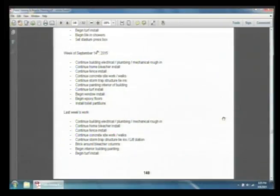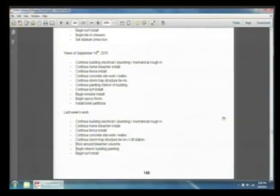In order to lay that surface correctly, there won't be any fence fabric installed on the fence pole. So what we'll do for the October 2nd and a few weeks to follow until the track is laid is the top rail and bottom rail will be installed about a foot to 2 feet up, so that it serves as a barricade around the asphalt track in the field during those two remaining home games and few soccer games that we're going to be able to fit in October. And then once the track surface is installed, then they'll put the fence fabric on in the finishing touches. We'll have some landscaping installed before October 2nd, and then there will be some remaining landscaping that will need to be completed after October 2nd, and the track striping will probably occur at the end of October, early November.